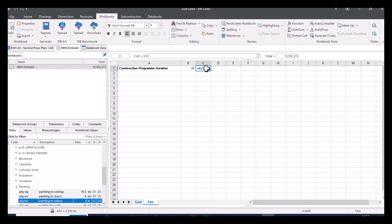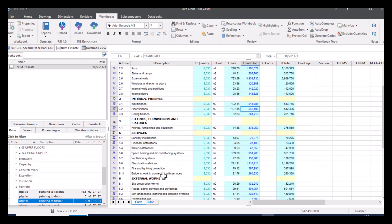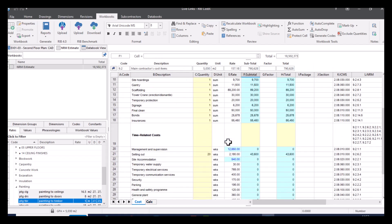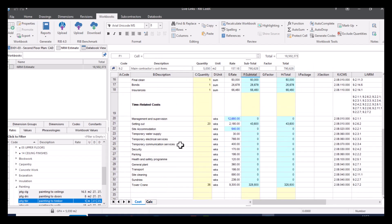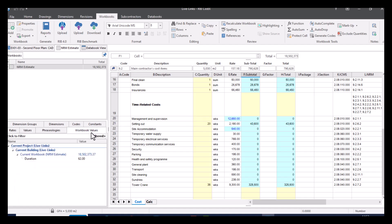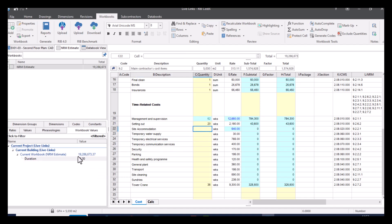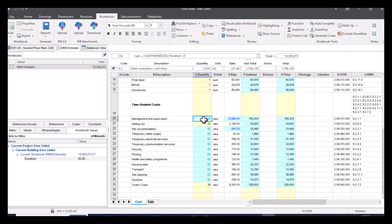So we can see that that is indeed a named cell. If I want to put this information anywhere, for example, let's go back to our cost sheet and go to our prelims. If I double click on here, we can see down here that we do have quite a few items which need the construction programme duration input. So what I can do is just go to my workbook values tab here and just click on this. And as you can see, I've got my workbook value or named cell in here that I can simply just pick up and pull across to the cell that needs it. So I'm just going to populate all of these items. As you can see, the text is green and it's actually got this formula in. So get named cell duration. So when this is updated, once again, this will automatically be updated.